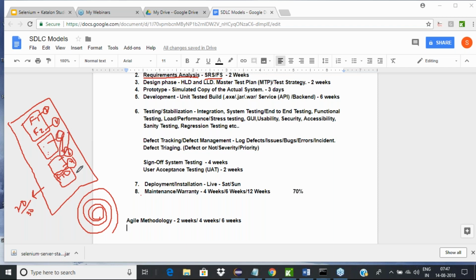And these are not explained in a big document like this. They are explained in a single page, and we typically call it a user story. It is named so because ultimately the user is going to use this feature, and when the user uses it, for example, cancellation of an order, how is he going to use that feature? That story needs to be explained. As an existing customer of ABC commerce system, I've already created an order, and now my requirement is to cancel the order.